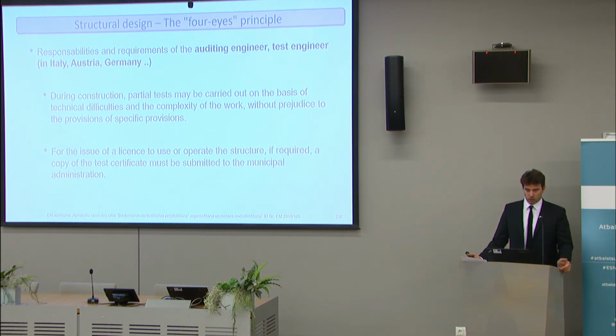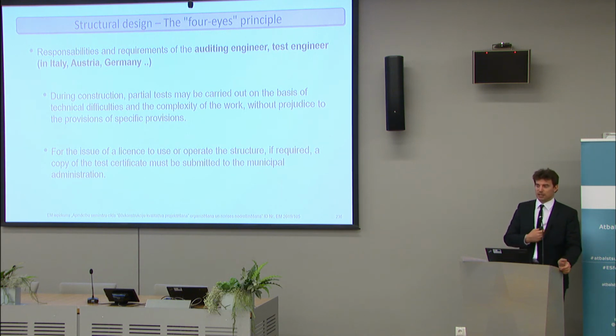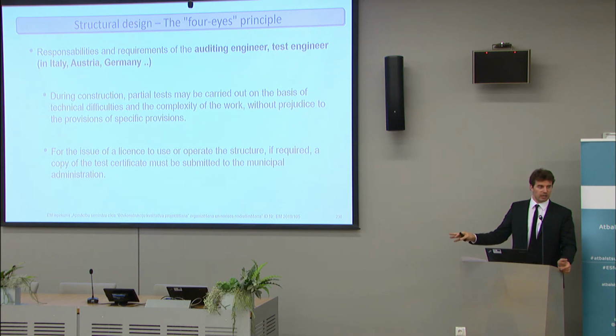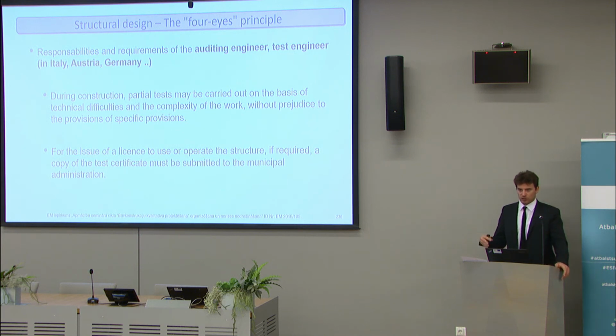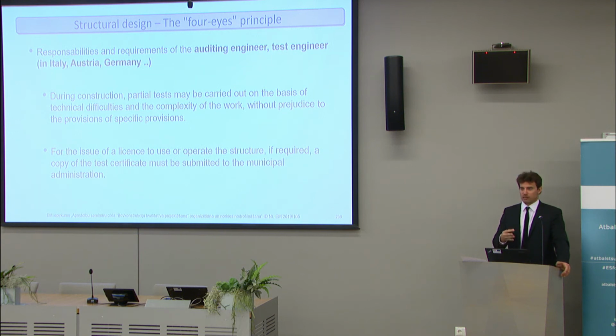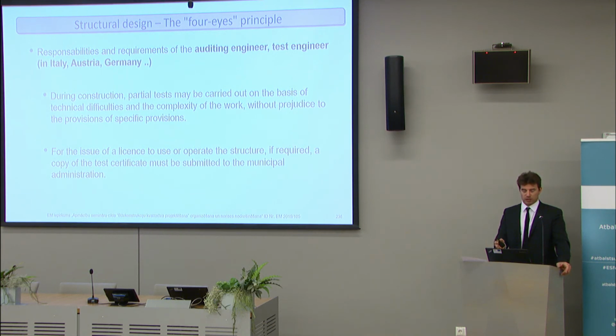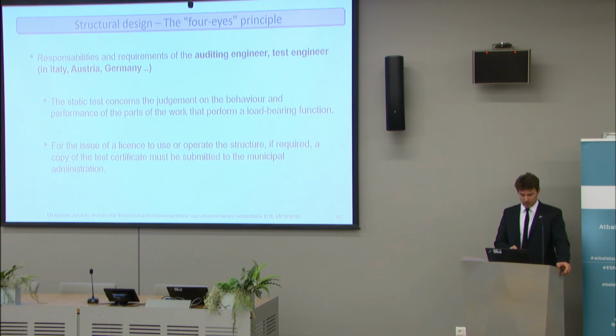foundations. So they always send you the things at the last minute. But in that case, if they really would have built that pile like this and it was not okay, either they would have to recalculate everything and find a way to say that it stands anyways, or they have to demolish what they built until that point. So this was the situation in that case.